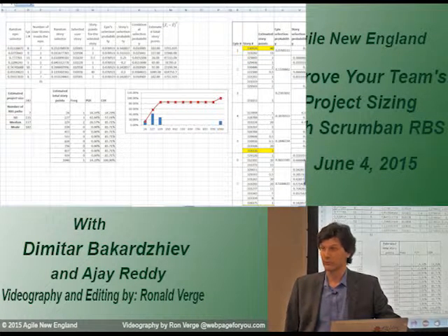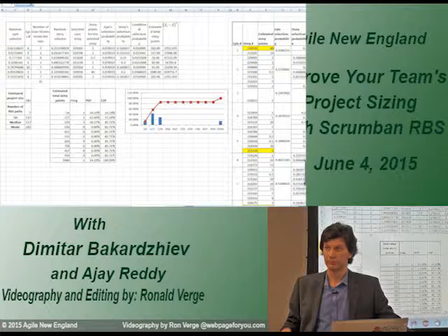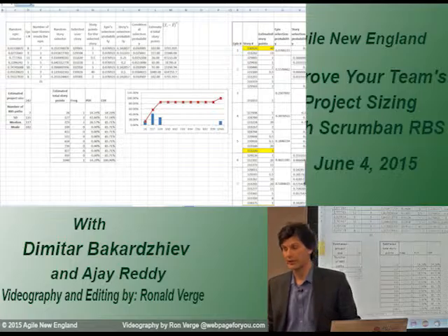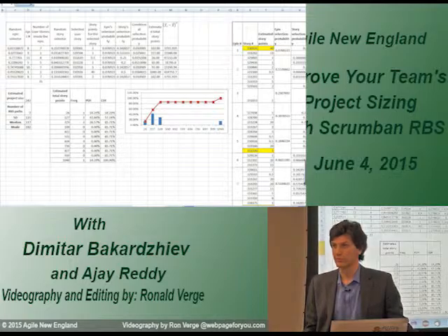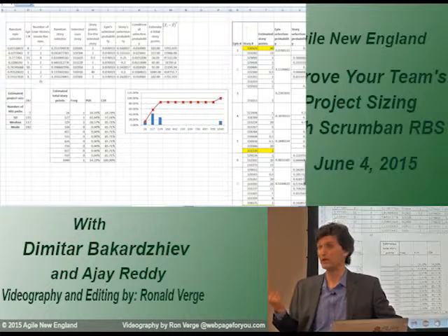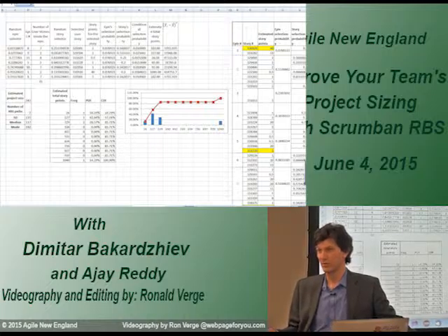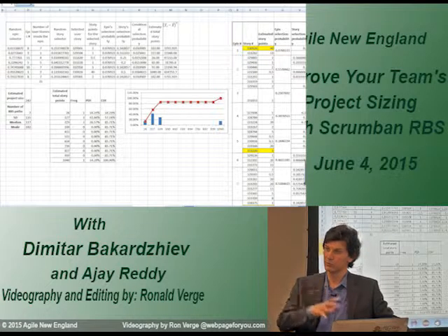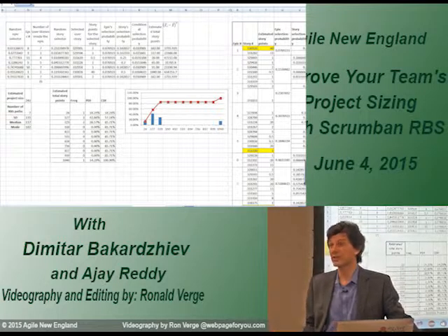And I start from scratch, right? I add the epic, I change the selection probabilities, I sample again, right? Because the context is changed. And then I will find the new size of the project. The easiest way is that if we have only one epic, and we break it down, and it's like 3 user stories, right? So just analyze those 3 user stories, and add it to the size of the project, something like that. So again, it's just a technique, right?